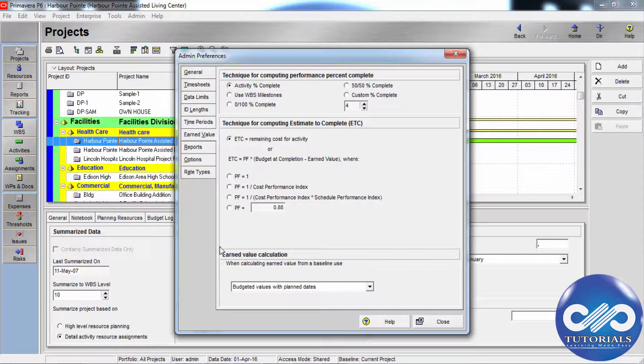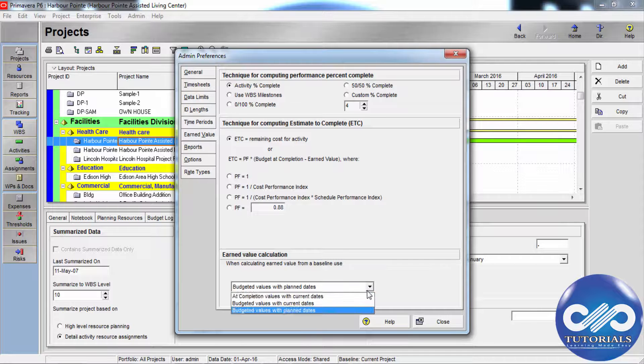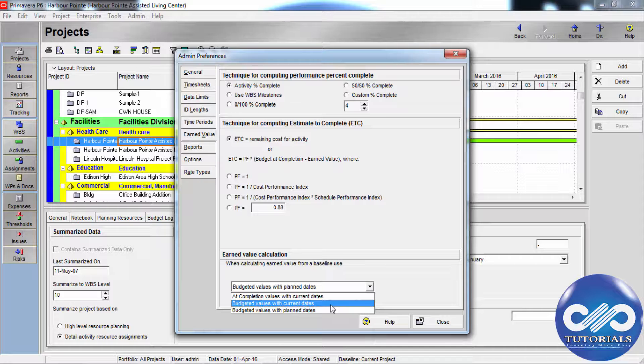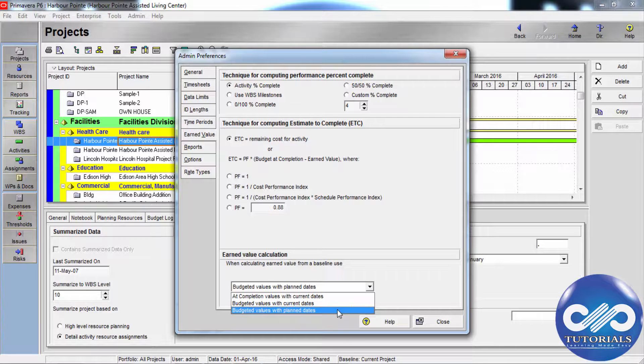now go to this bottom, in the earned value calculation section, choose to calculate earned value using actual completion values with current dates, budgeted values with current dates or budgeted values with planned dates.